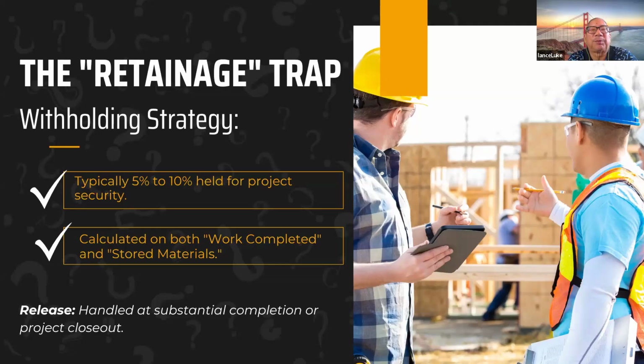Like I mentioned before, the total amount being billed is $100,000. Retention is 10%, so you withhold $10,000. That actually doesn't get paid to the contractor until the tail end. Probably the last payment to the contractor is all the retention that was held back. And there's a reason for that. And when is the retention going to be released? That has to be specified in the contract.